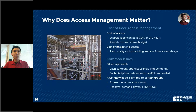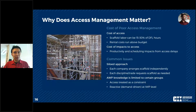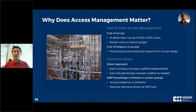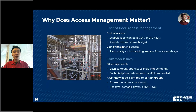When we talk about why access management matters, it comes down to cost. We break down the cost of access into two components: the cost of labor and the cost of material. Scaffold represents 20 percent of construction costs. On the labor side, based on historical data, scaffold can be anywhere from 15 to 30 percent of direct field labor hours — for every 100 direct field labor hours spent on a project, you will spend 15 to 30 hours on scaffold. That range is not all-inclusive; some projects have gone even above it.